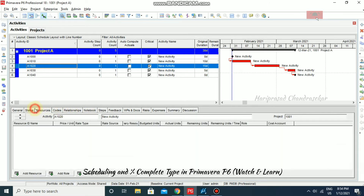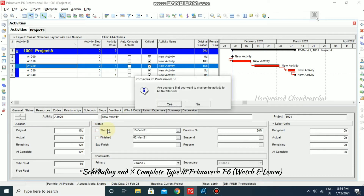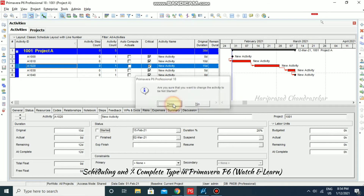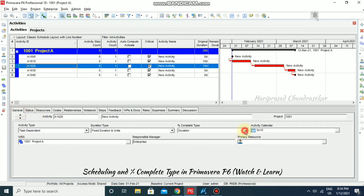Going back and checking the start — it asks 'Are you sure you want to change the activity?' — yes. Then the remaining automatically becomes 15 days because we have not started the activity.